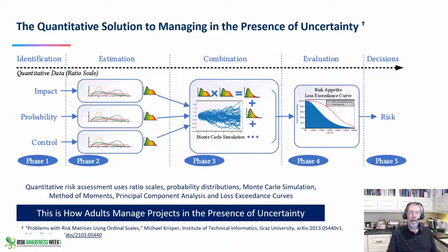In our engineering risk management world, we want cardinal numbers. I have an 87% probability of showing up at the launch pad on time with an 82% confidence of that 87% probability. That's good enough for us to win the job. When we're 4 months away from launch, it better be up in the high 90s. And of course, 2 days before launch, it better be at 100, or otherwise we're not going to make it. But this is the link here to go do that.